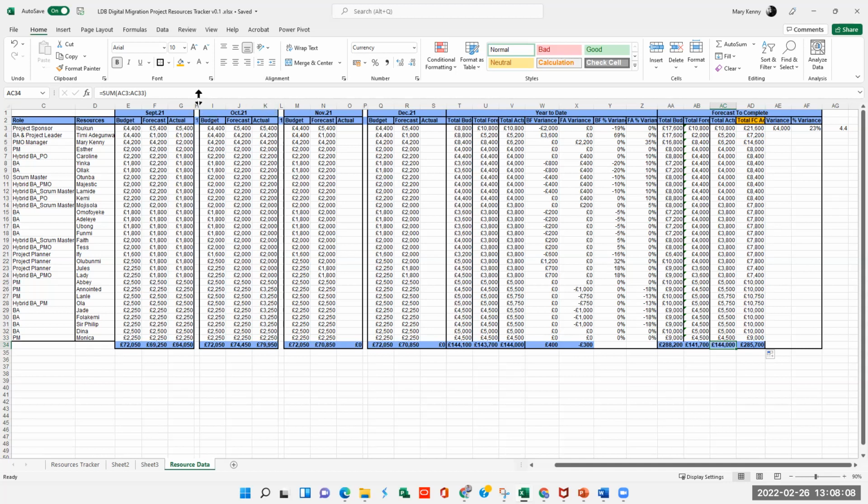which is from September and October, and your forecast, which is what you have still yet to spend, which is November and December. So you add both of them together, and these two numbers will make your forecast to complete. So that will form your forecast to complete in projects if you want to do it that way. Sometimes you don't have to be involved in resources and linking it. Sometimes it will just be these big numbers, but you need to understand, when you extract the information from the system, what is making up all of those differences.